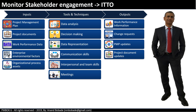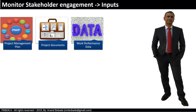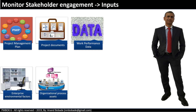Let's look at the inputs, tools and techniques, and outputs. The inputs are: project management plan, project documents, work performance data, enterprise environmental factors, and organizational process assets.